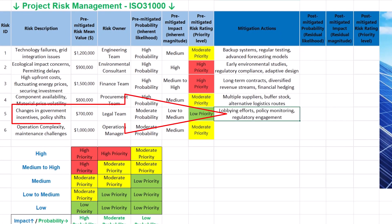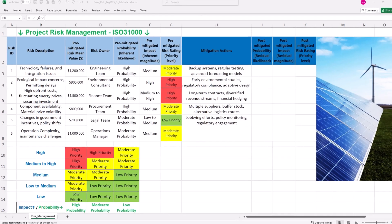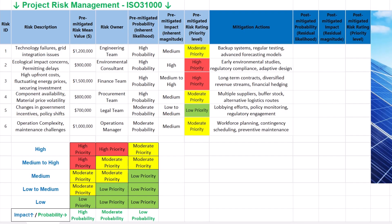Implementing mitigation actions such as lobbying efforts, policy monitoring and regulatory engagement aligns with best practices for managing risks associated with changes in government incentives and policy shifts. Proactive engagement with policymakers and continuous monitoring of the regulatory environment are essential strategies to anticipate potential policy changes. For operational risks, implementing workforce planning, contingency scheduling and preventive maintenance aligns with best practices. The Electric Power Research Institute emphasizes that maintenance planning and scheduling are critical for optimizing resource utilization and minimizing downtime. To complete our risk register, we must calculate post-mitigation values of residual likelihood and residual impact.